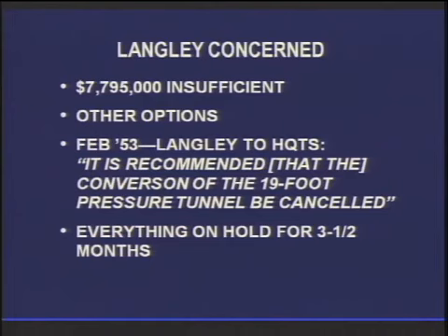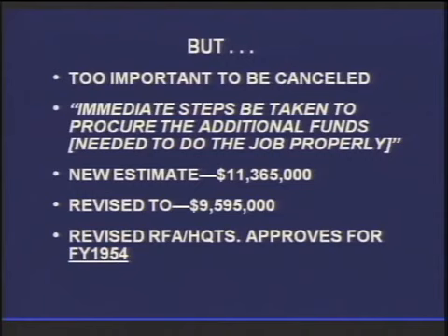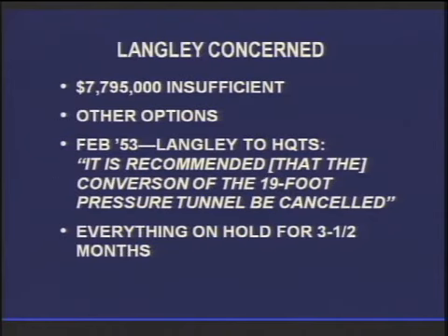And finally, in February of 1953, they fire off a package to Washington headquarters, and they say, whoops, it is recommended that the conversion of the 19-foot pressure tunnel be canceled. You can imagine that got somebody's attention up there, right? The net effect was it put everything on hold for 3.5 months. Actually, cold hold for 3.5 months and partial hold for a lot longer.